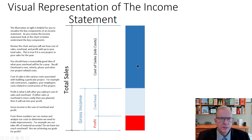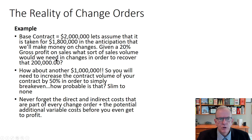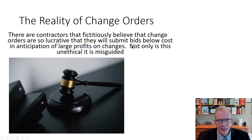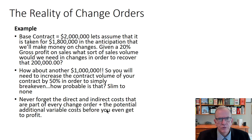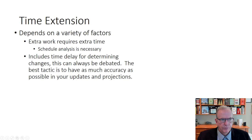It's good to understand that and to determine what our target markup should be. We mark up our project so that when we multiply that factor in, we will have covered our overhead and profit. So for changes, we have to make sure we are also covering overhead and profit. Some contracts will limit your ability to put on overhead beyond a certain amount, so you have to be very careful about what you're signing up for.